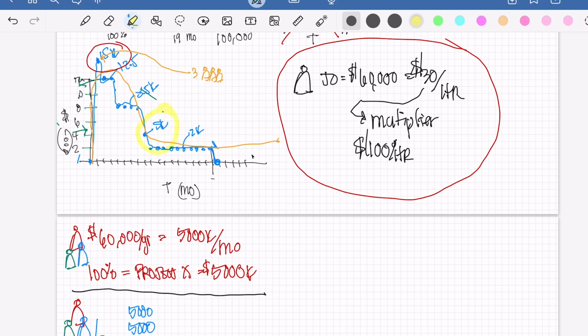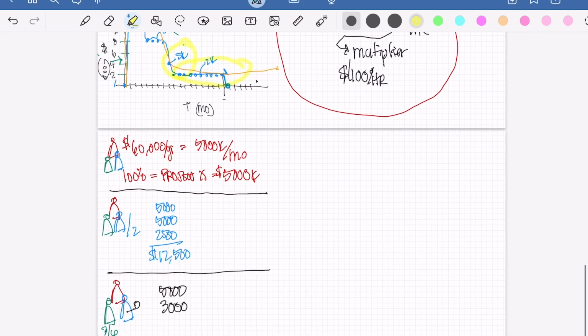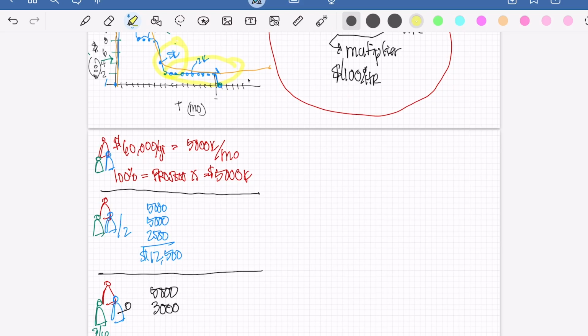And we're getting pretty heavy on the examples, but as you can imagine, with $5,000 in bidding negotiation, it is just Joe. And then when you get to CCA, it's not even half of Joe. It's $2,000 a month. So what started out as 3 people, hot and heavy, then became 2.5 people, then became 1 3/4 people, then 1 person, and then not even half a person.